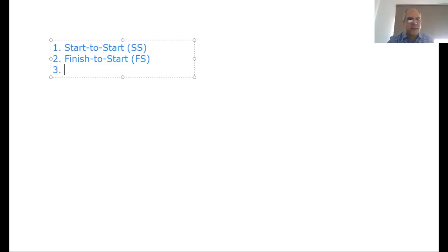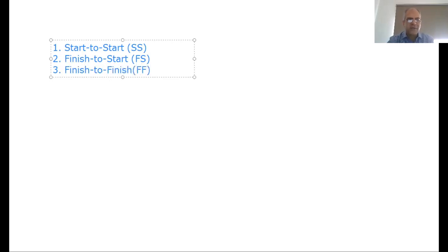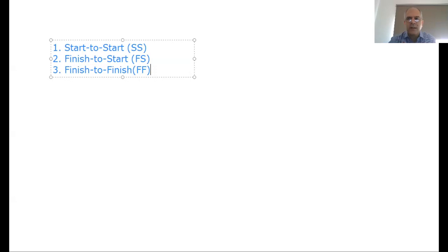The third dependency is known as Finish-to-Finish, noted as FF. This is the opposite of Start-to-Start. The starting periods of these activities are not relevant; rather, the ending dates are relevant. We don't care when A or B began — what matters is that both come to a conclusion together.